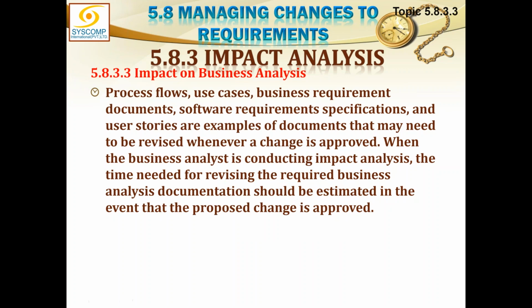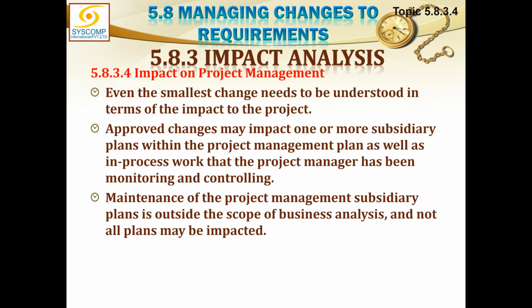Process flows, use cases, business requirement documents, software requirement specifications, and user stories are examples of documents that may need to be revised whenever a change is approved. When the business analyst is conducting impact analysis, the time needed for revising the required business analysis documentation should be estimated in the event that the proposed change is approved. Even the smallest change needs to be understood in terms of the impact to the project.